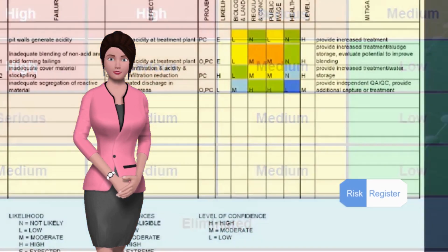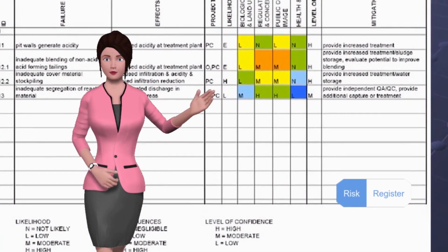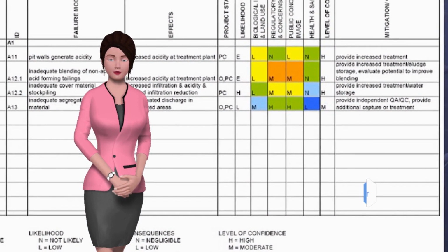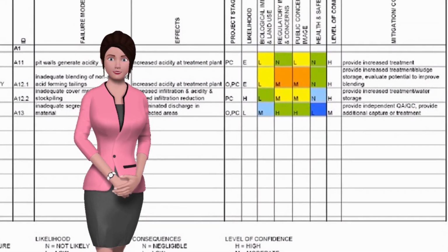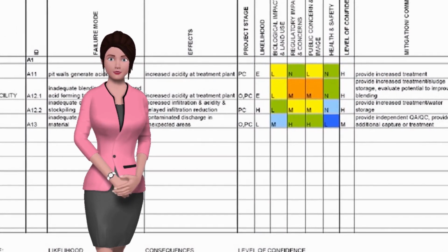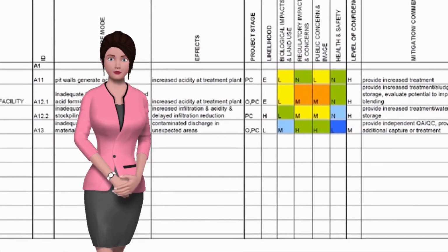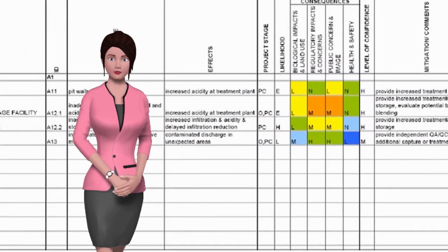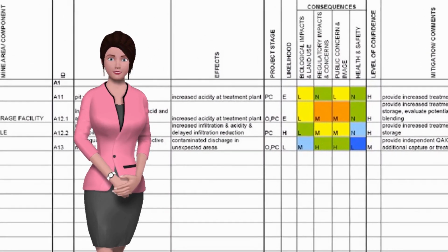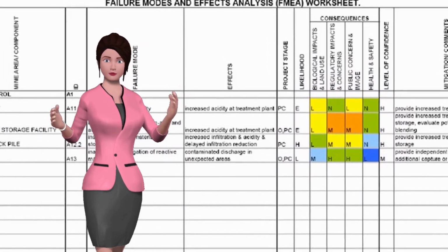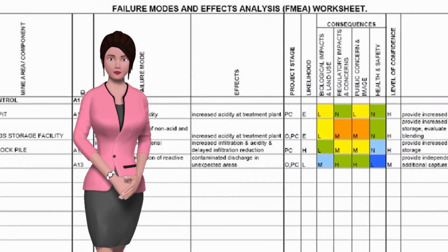Number 4. Risk register. Similar to the risk assessment template for IT is a risk register. Basically, what a risk register does is identify and describe the list. It then will provide space to explain the potential impact on the project and what the planned response is for dealing with the risk, if it occurs. Furthermore, the risk register allows a project manager to prioritize the risk, assign an owner responsible for resolving it, and gives a place to add notes as needed.